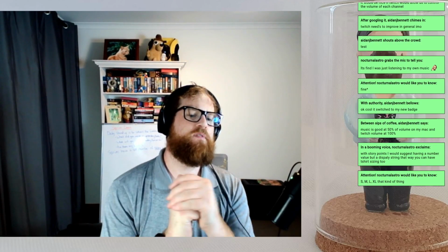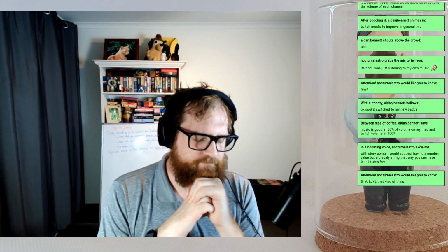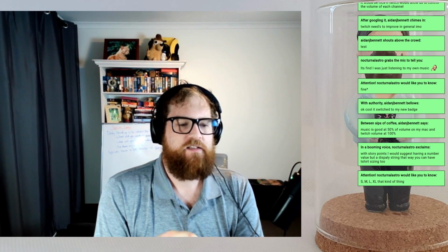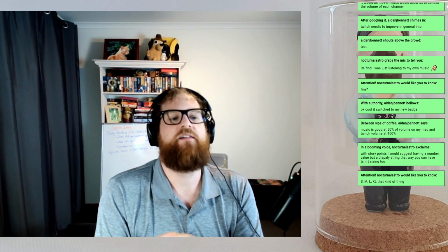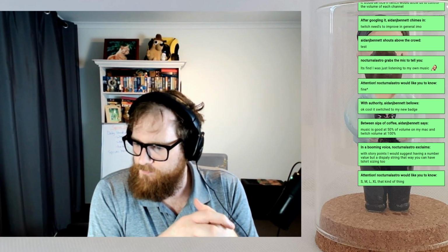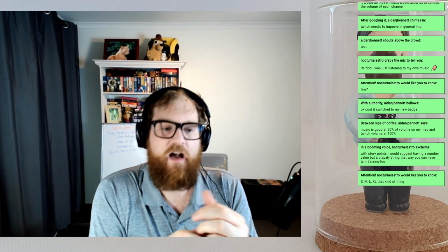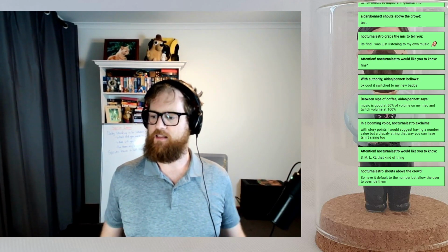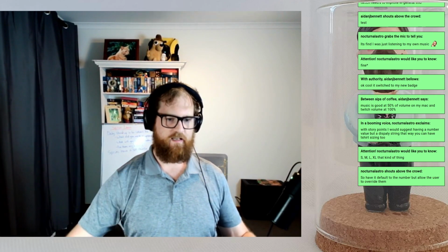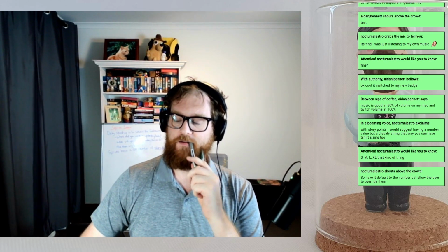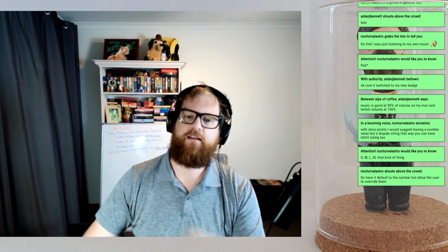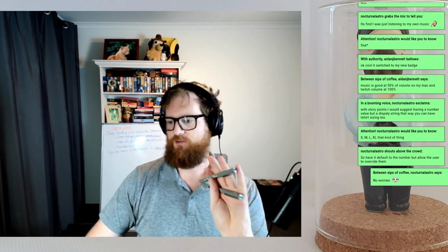In fact, in the old version of NearBeach, I was implementing story points. One story point could represent 4 to 12 hours. Oh, okay. Yep. Small, medium, large, extra large kind of thing. Oh, okay. So have it default to the number, but allow the users to override them. I'll probably need to talk to you about that more, because that's just in research at the moment. So I'm open to any idea or feature request people want.